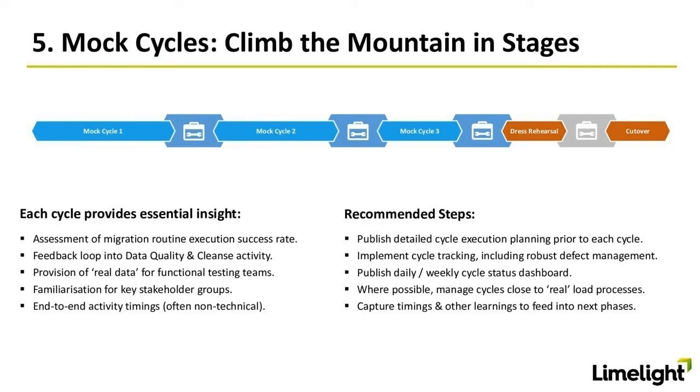And then finally, it's an opportunity to get a sense of end-to-end activity timings. And often they're not the technical timings. Typically we would think, oh, we can measure how long it takes to extract data, to transform it, and so on. Very often that's not the limiting factor when we look at the timings in a migration. There is time required to review extracted data and verify it. There's time required to bring people in to look at what we call preload before we load it into the target system, and so on. So every mock cycle we do is effectively an opportunity for activity timing, and we talk about trying to start and stop the stopwatch a little bit as we run through those mock cycles.